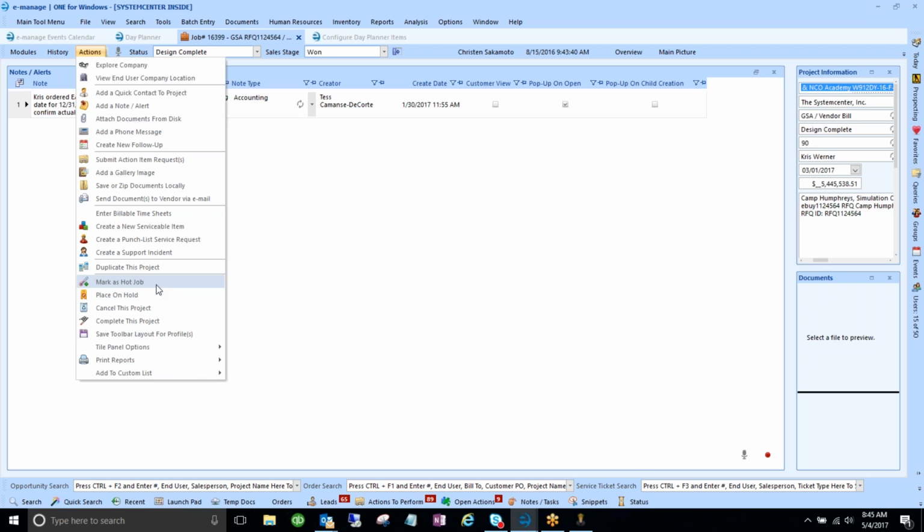We were using hot job as, this is a super hot job, we've got to get it done. Well, what we found is a salesperson will mark every job as hot. So we ended up having a gazillion hot jobs, and the hot job really didn't mean anything anymore because everything was hot.